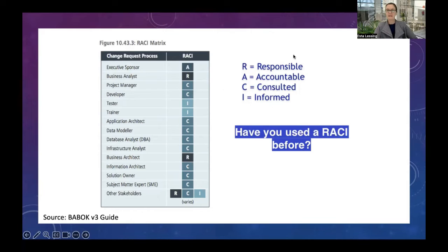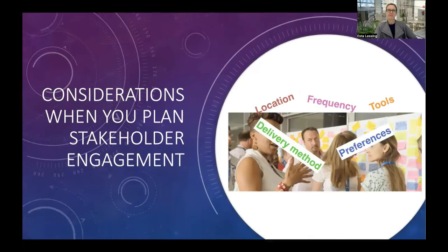These might be dedicated subject matter experts that have been assigned to your project to work with you. Who's accountable for delivering certain artifacts relating to your workshops? Who do I need to consult as a business analyst regarding the requirements? And who do I need to keep informed? So that's just one other way that you can apply the RACI Matrix for your particular business analysis purposes.